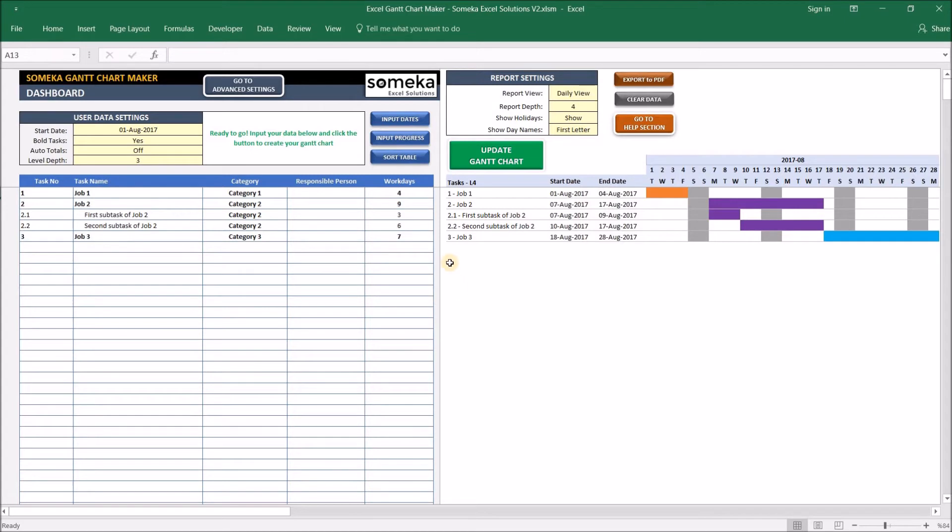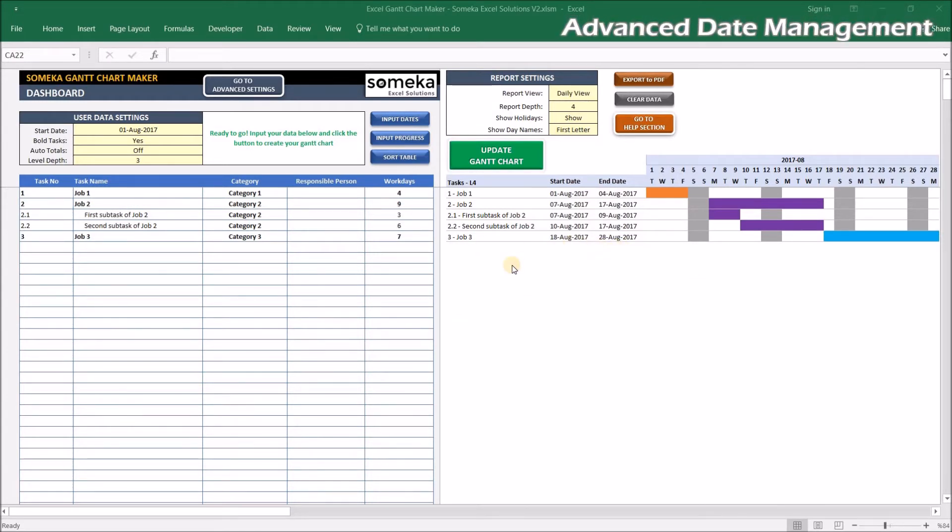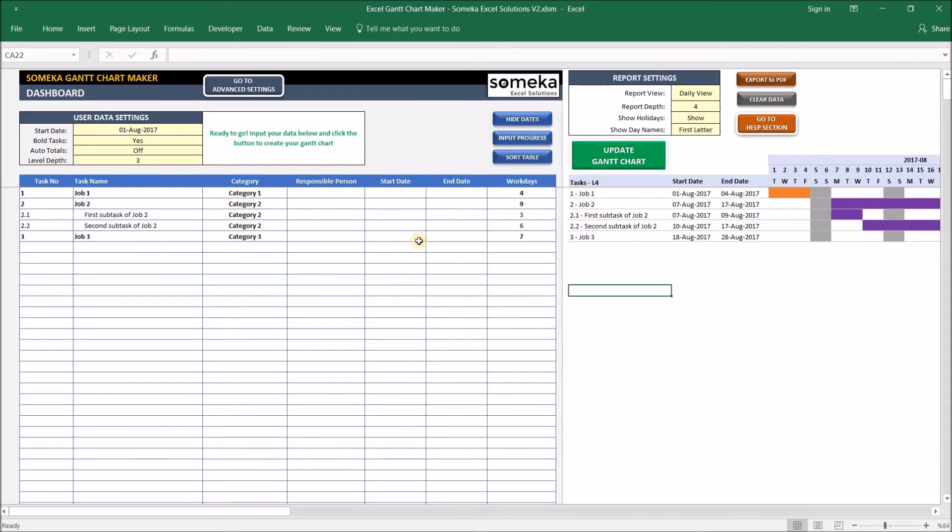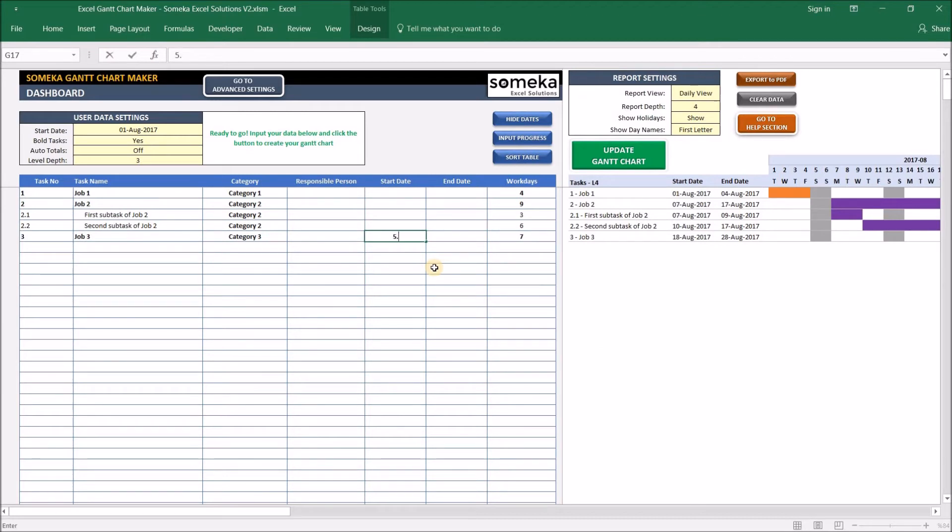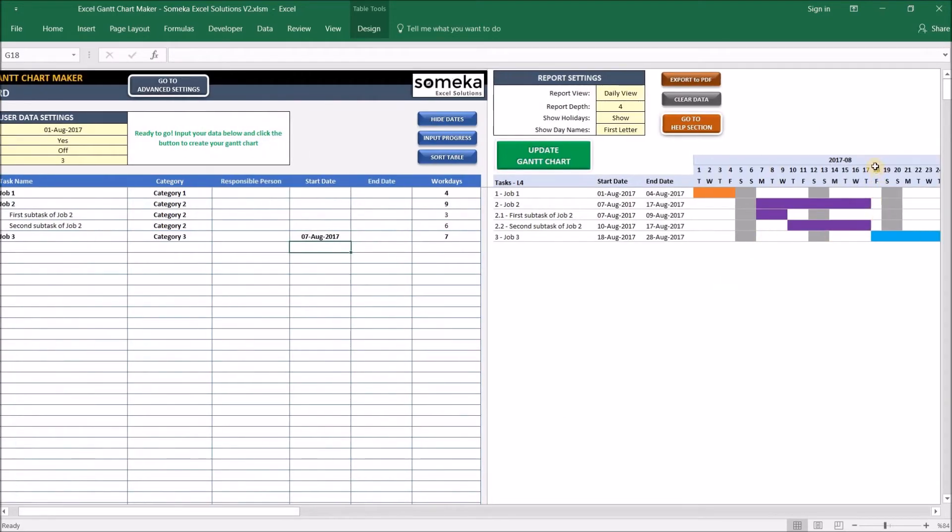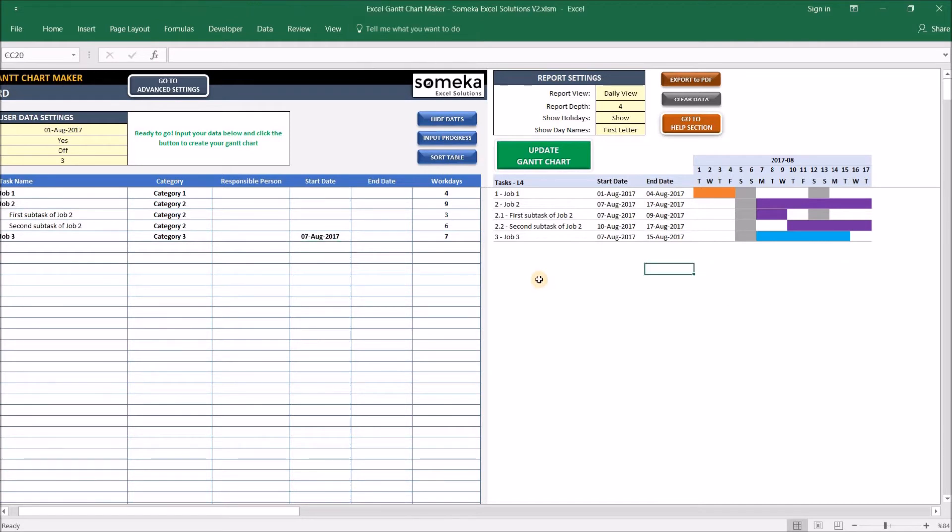Okay, great. But we have an issue here—my third task is starting too late. I wanted to start earlier. So how do we change this? By default, the tool sets the dates of each task thinking that it will follow the previous job, but we can change this by inputting manual dates. Let's click on the Input Dates button here and let's change the start date of Job Three. I'm going to make it the 5th of August. Oh, it's a weekend, so let's make it the 7th of August and update my Gantt chart. So I don't want it to start the 18th of August but start earlier. So now it changed the date.